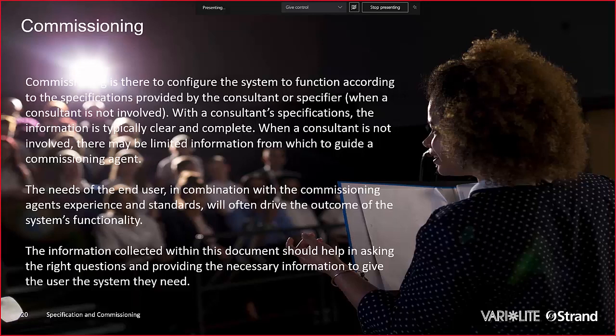But again, the goal is to have the information on these tables sort of pre-filled out and pre-collected and available to sort of hand over to the commissioning agent so that they have some direction with which to go by. They understand the modes that are needed and the fixtures ahead of time, and that will go a long way to simplifying that commissioning process.